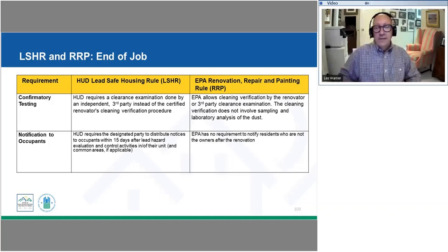And so we're going to send that contractor back. Generally, they're going to be doing another cleaning of that area, and then we're going to bring our clearance tester back in and retest those areas. And we're not going to pay that contractor until we have acceptable test results.